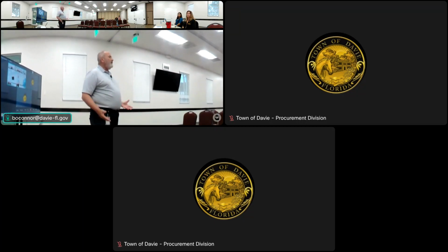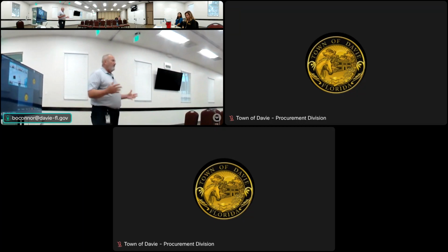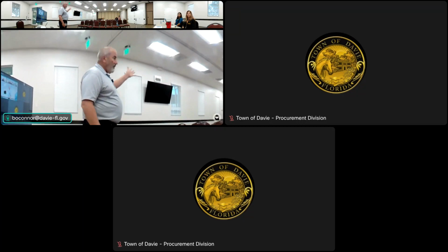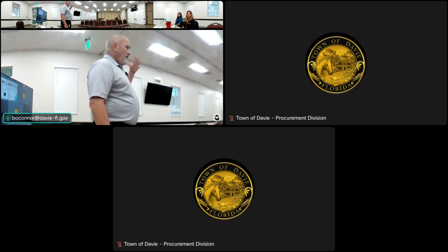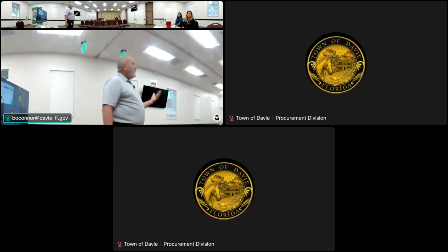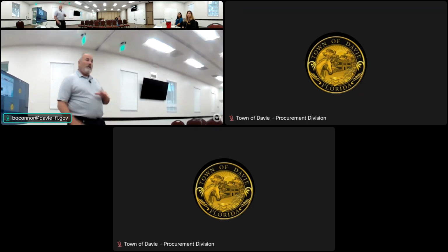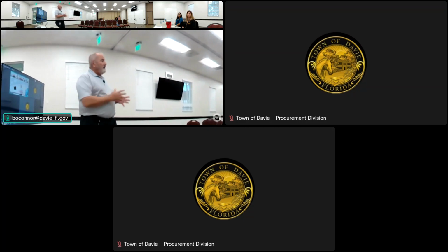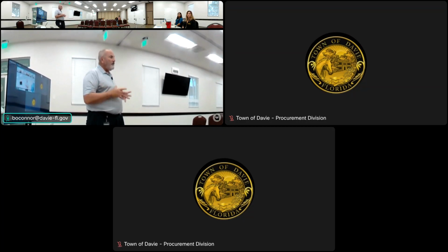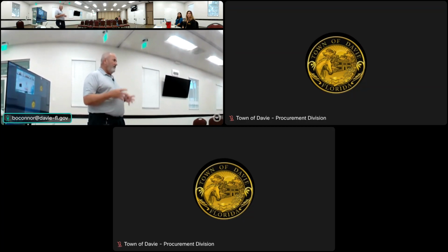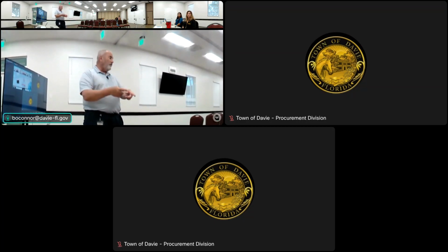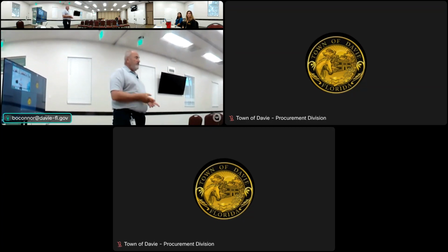Now, if we had something come up where we were going to build a pedestrian bridge, let's just say across one of our major roads, like University Drive, and it was over the threshold of $4 million, we would have to go out for an RFQ, even if we had a continuing contract pool. That's the part you really run up against, those continuing contract pools that we already have established. Because those are in place and they make it easy, we can point and shoot those pools. That's why it's easier for some of those things.